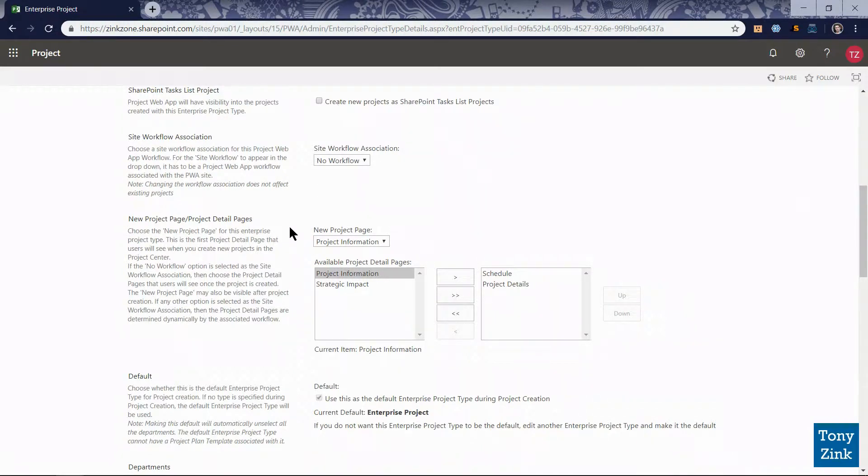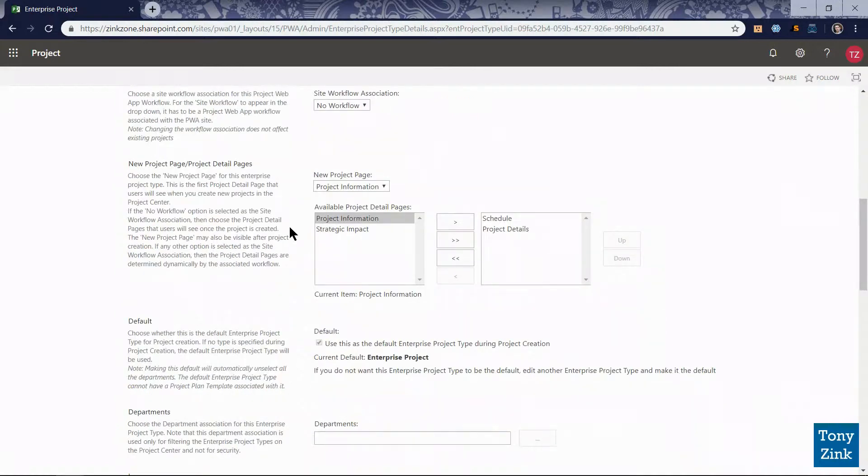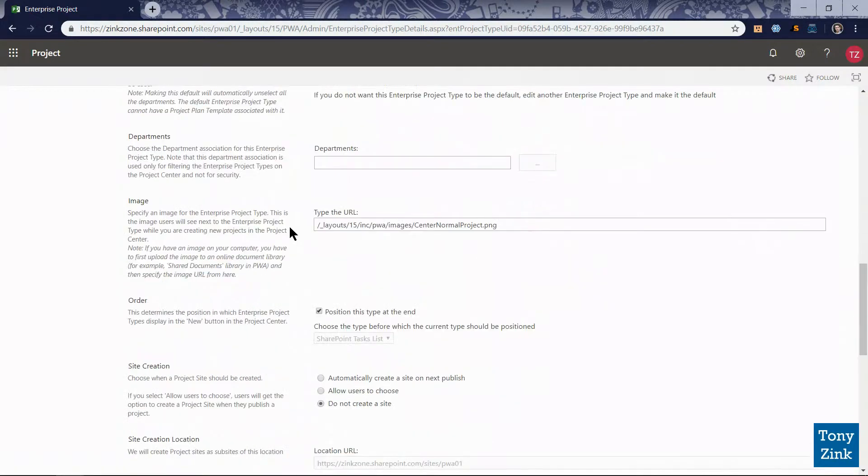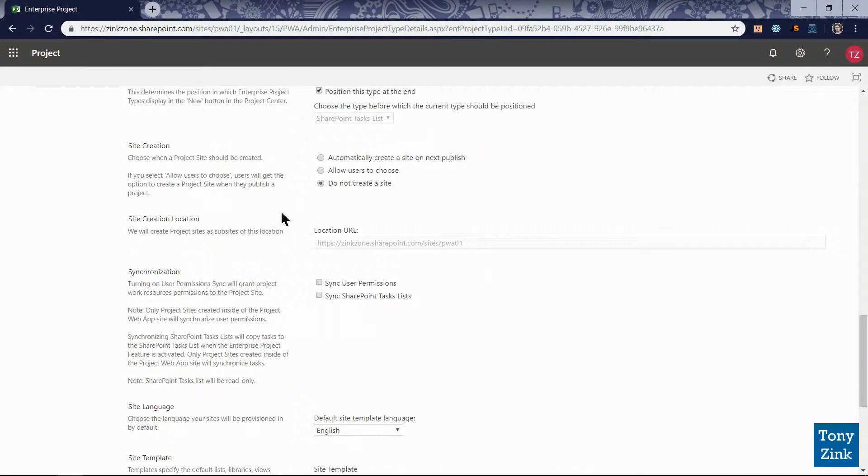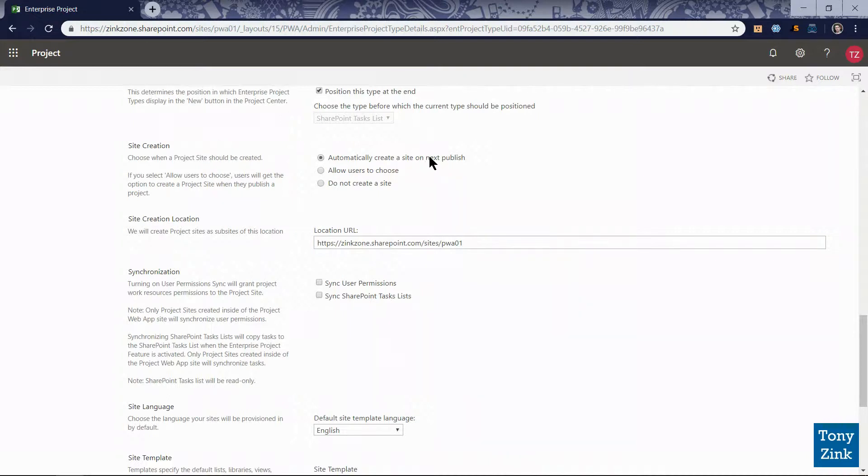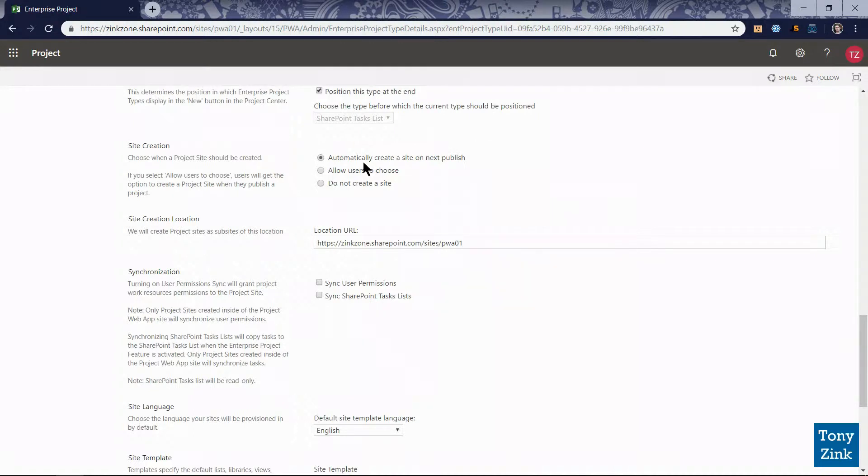I'm going to leave most of this stuff as default and some of these things will come back and change later but I'm going to go down to the site creation configuration settings here. For site creation we can control whether or not a project site is created for every one of these basic projects in the system and so we have three options here. I'm going to change this to automatically create a site on next publish. So every time someone creates a basic project in the system the first time that project is published it'll automatically create a project site which is a SharePoint collaboration workspace for team members on that project where they can go and track project related documents issues risks and so forth.